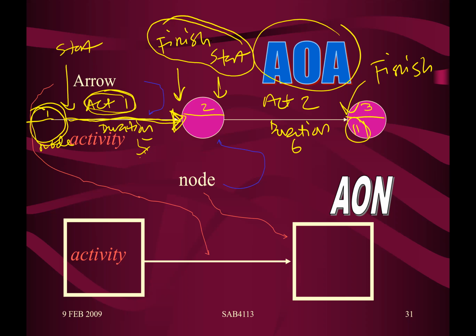That's why I say to you, the PDM diagram is now widely used, because it can accommodate many different relationships, whereas the old one only uses finish to start.